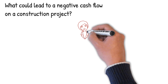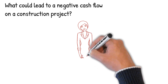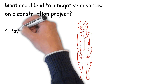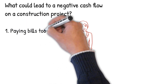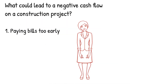So what are some of the things that could lead to bad or negative cash flow for a construction company? Paying bills too early. It may seem prudent to pay bills the moment they arrive, but doing so can leave a construction business low on cash or even create negative cash flow if they do not have cash coming in.